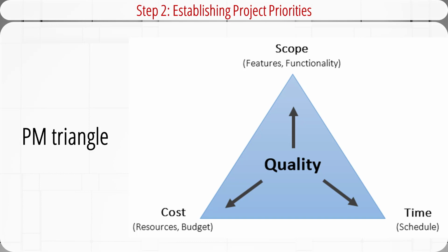The quality of work is constrained by the project's budget, schedule, and scope. The project manager can trade between these constraints to some extent. Changes in one constraint necessitate changes in others to compensate. Otherwise, project quality will suffer. For example, a project can be completed faster by increasing budget. It can also be achieved by cutting scope.